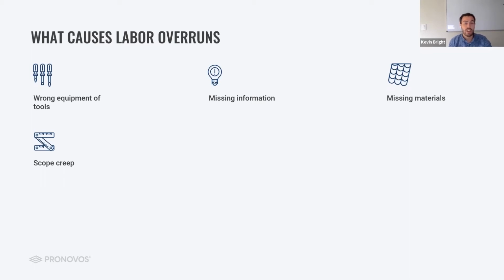We'll just take it down there. Well, little did we know, that extra 100 yards, doing it dozens of times over and over and over again throughout the course of the project, really adds up. And by the end of the activity, we ended up running about 20% over in our labor. So that's a good example of how these very small things and that little bit of scope creep can really build up over the course of a project.